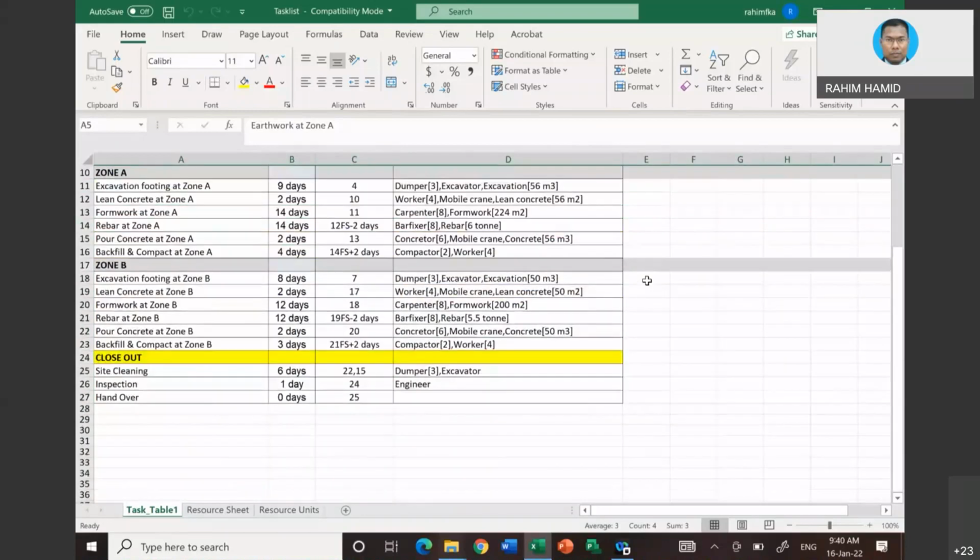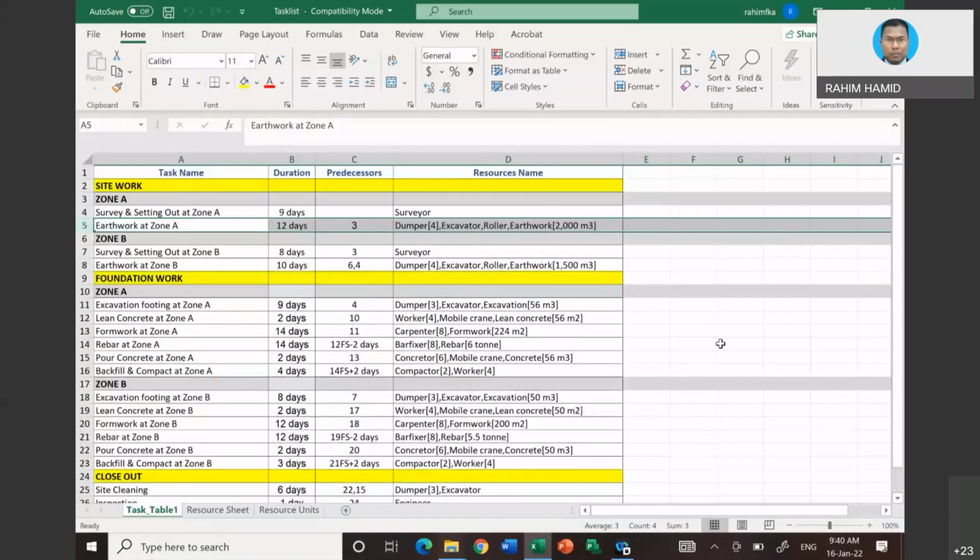I would say the one of the difficult thing in developing a project is basically to come up with all this information. We need to get all the information to calculate the duration, to figure out what could be the best resources, etc., etc. And when you choose the wrong resources, even though you can execute the work maybe faster, but then the cost might be very high. So still, there is no point of doing so because you are not going to get a lot of profit. Okay, so it must be a balance.